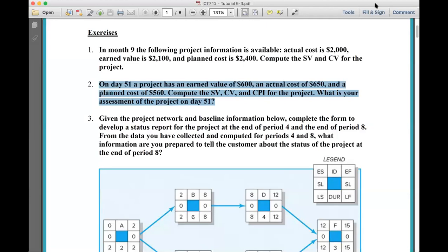And SPI is leading ahead. Schedule variance is plus 40, so we are ahead of schedule. Ahead of the schedule, yeah. Cost variance is minus 50, so we are over budget. Behind, over budget, yeah.